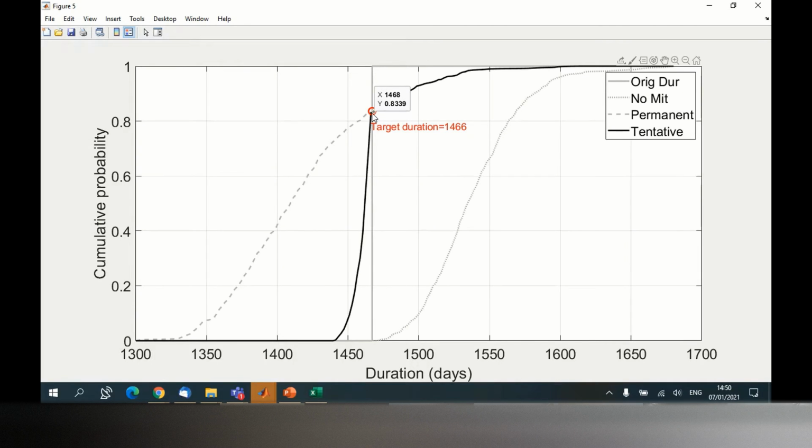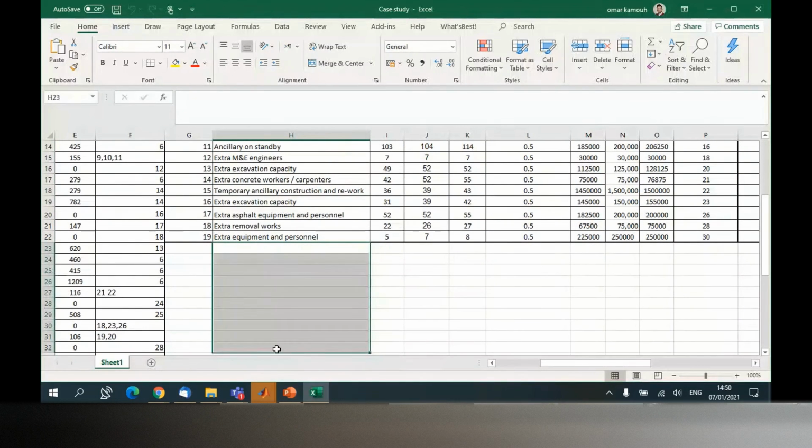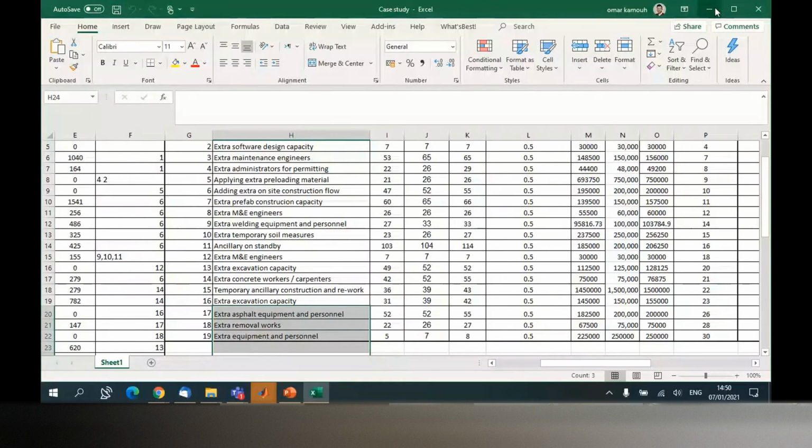If someone wants to answer, what if you get a low probability here that you are not happy with? So I'm happy with 83%, but if it was 40%, then I'm not happy with it. It's still low probability. What would you do in this case? You increase this probability by introducing additional measures. This means if the probability is low, so you use the mitigation controller, but the probability is still low and it's not enough for you, then these measures are not enough. Then you have to extend them. You have to provide new ones. Because the software implemented that, and then the probability is still low.